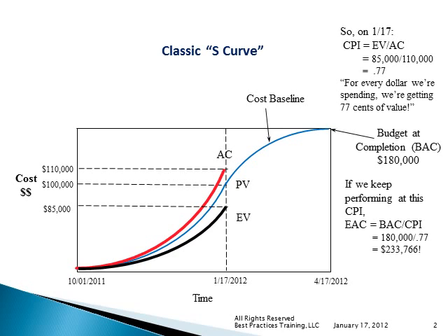We don't have the budget at completion for the end of the project. The reason? We don't know how many prototypes we're going to do. We don't know how many sprints or iterations we're going to do. We could figure out very accurately the planned value for the first iteration, perhaps the first two iterations. We know the schedule and the budget for each of these iterations, but we don't know how many iterations we're going to end up doing for the project. Therefore, we can't put together a complete time-phased budget, a complete S-curve for the project overall.